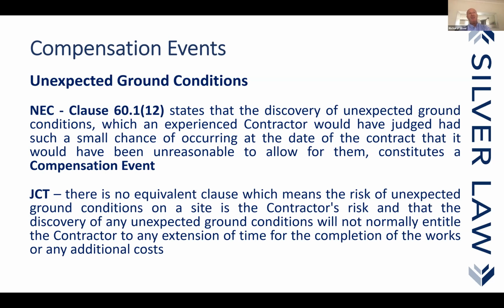Now, to try to get around that, what quite often happens is that there is an exclusion clause at the back of the soil report saying the contractor should not rely upon it. But there is a case, Bakel, where it was identified that in order to be able to rely upon this exclusion clause, it must be brought to the attention of the contractor. They must be able to easily see it and find it. The more onerous the clause or the limitation exclusion clause sought to be imposed upon the contractor, the more this exclusion clause must be brought to the reasonable attention of the contractor.